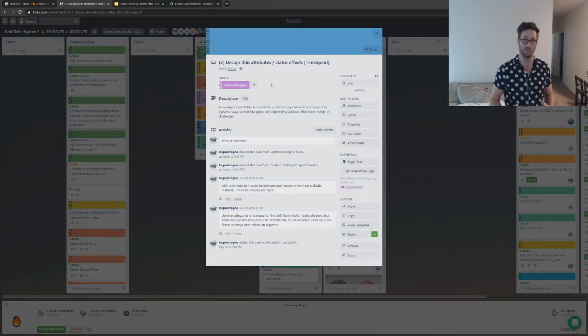Other methods will use the t-shirt sizing I showed in the meeting video or presentation, and that would be like, for example, we used it in school, the Fibonacci numbers. So it was 1, 2, 3, 5, 8, 13, and so on. And so that was like our scale of, instead of 1 to 10, something a little more expressive. But that's a little more abstract, and I wanted to keep this as simple as possible. So how many hours? I think designing this effect could take maybe 1 to 3 hours, depending on people's experience with it or how far they want to take this. And it's just a guesstimate, right?